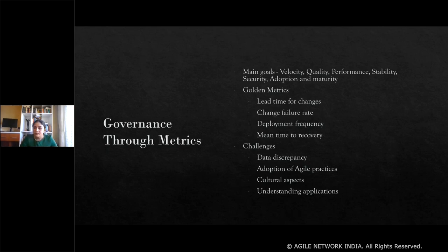When the build is arriving, the scripts are not working, they are only working 20%, and you are claiming that your automation is working 85%. Now, during estimation of the project, the estimation has been done basis that only 15% manual testing will be required and 85% will be done through test automation. While on the contrary, in reality, only 20% test automation will happen through scripts, while the 80% will still have to be done manually. So this is what I was referring to.